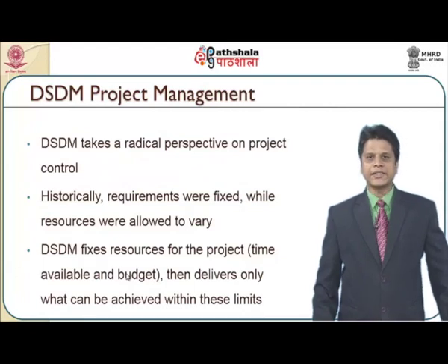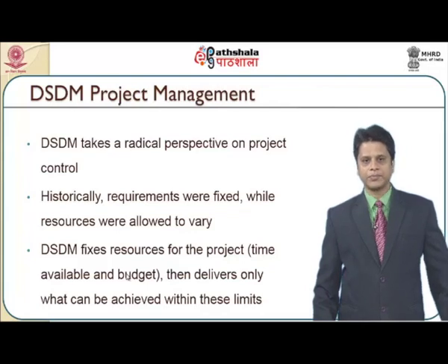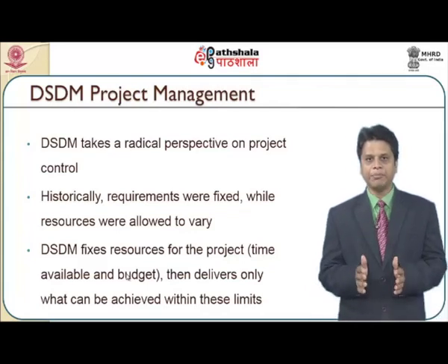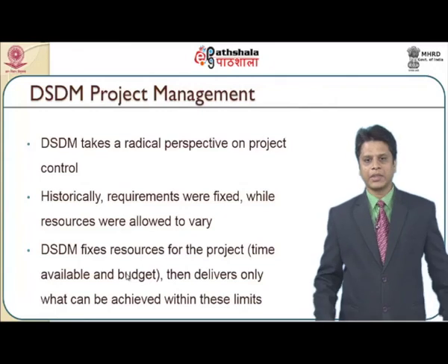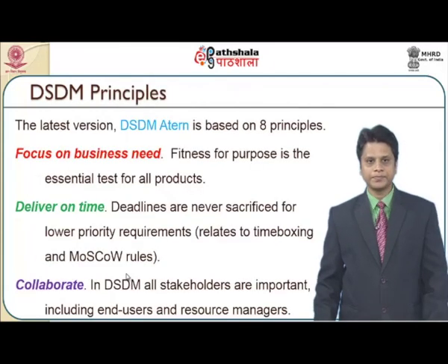Talking more about DSDM, it takes a radical perspective on project control. Historically, requirements are fixed while resources are allowed to vary. DSDM fixes resources for the project, that is within the time frame and within the budget, and then only delivers what is to be achieved within these limits.